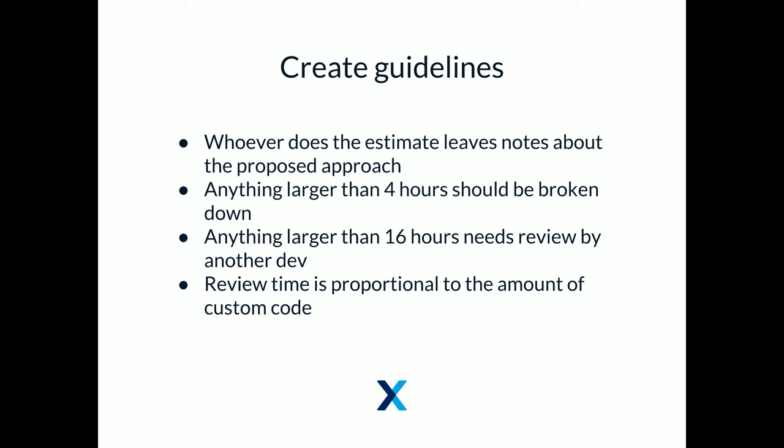And then anything larger than 16 hours, this is probably the guideline we adhere to least, should be sanity checked by another developer. Often one developer will say, oh, that's 100, and another will go, no, that's 20. And then it turns out that guy knew a way to do it that the first guy didn't.